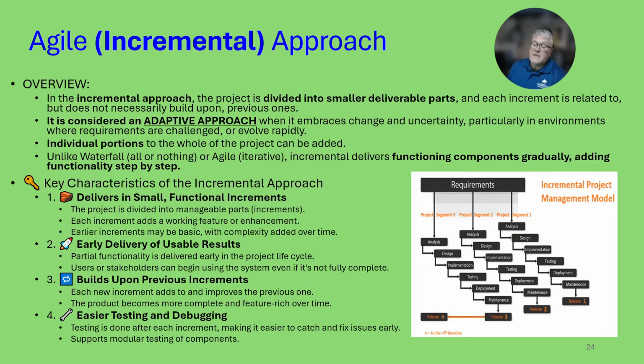Users or stakeholders can begin using the system even if it's not fully complete. And it builds upon previous increments. Each new increment can add to and improve the previous one. The product becomes more complete and feature-rich over time. Furthermore, it involves easier testing and debugging since it's broken up into individual sections. The testing is done after each increment, making it easier to catch and fix issues early. Supports modular testing of components.